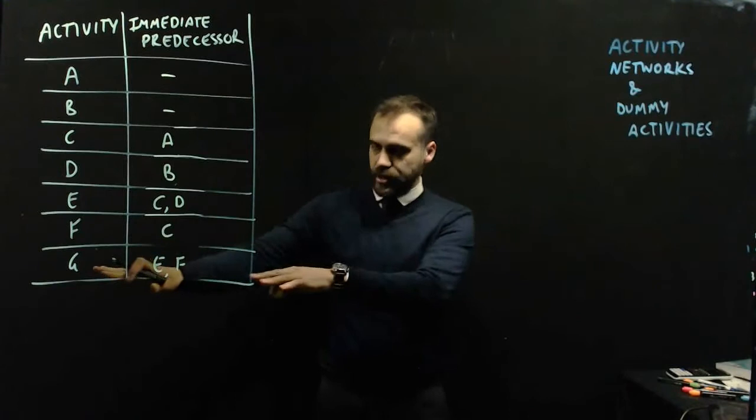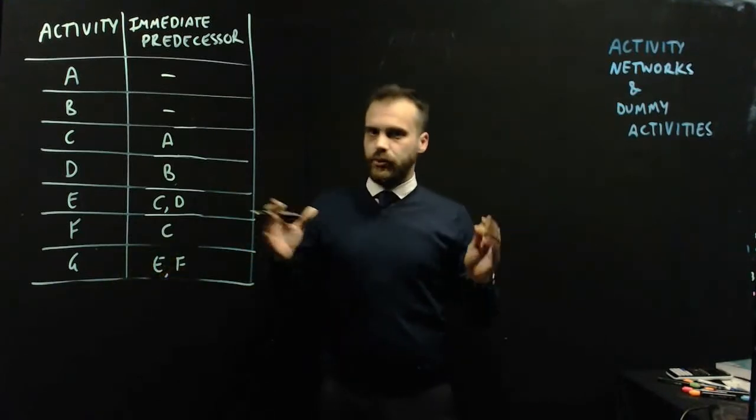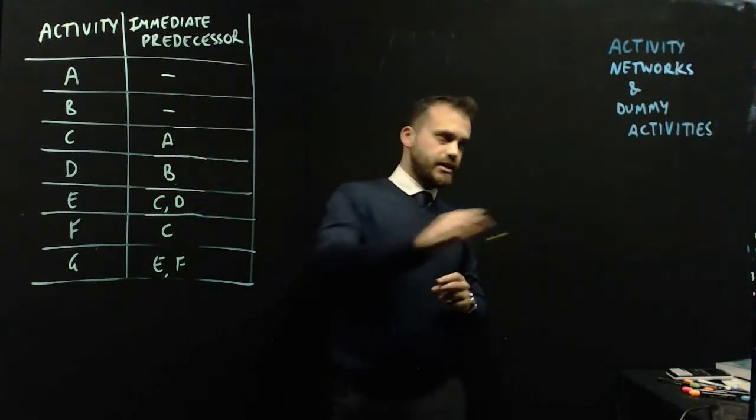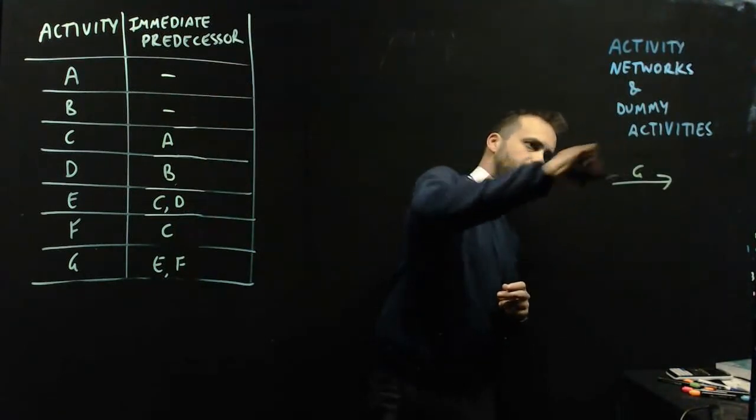Let's start at the finish and move back and see what we get. G is our only one that isn't a predecessor, so that's our final activity. There we have G.